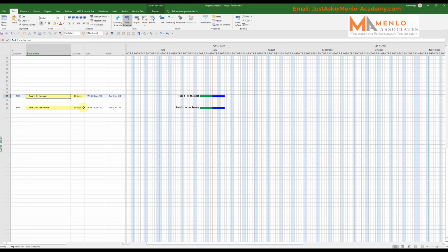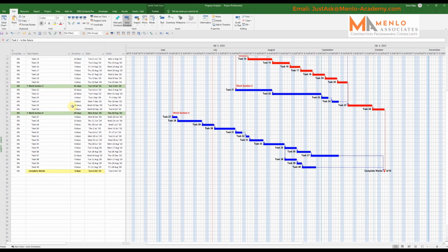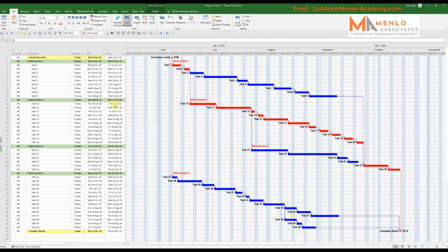Okay, and now we've got them all turned on in the program. I'll just take these back to 0, and we'll go back now and look at the program. Before we go any further, we just need to remember that we're tracking the progress, and we're going to illustrate the progress over a period of time to a client. So what we want to be doing every month as we're doing these status updates is to baseline the program so that we have a snapshot of where the program is at each stage.